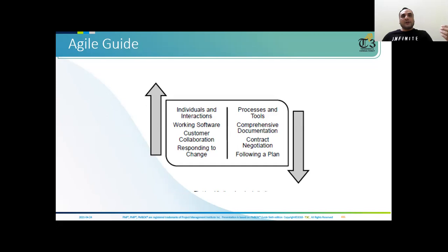But the agile methodology is used when the scope of work is not clear. Uncertainties are very high. You have not done those things before in your life. It's a totally new thing. So when you have totally new things, what do we do to reduce the risk? We do the work in iterations. When we do iterations, we provide incremental value, so we grow the size of the deliverable incrementally. Maybe one team is working, maybe multiple teams are working consequently to produce a single deliverable, a single increment, or multiple increments based on the provided schedule.